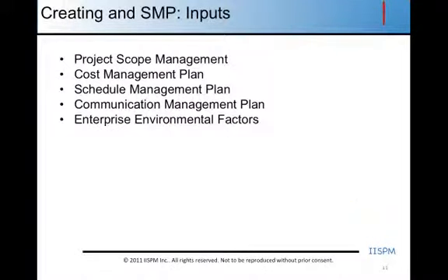So the inputs to create the sustainability management plan. We need the inputs from project scope management. We need the cost model, so we need the cost management plan. We need to understand the schedule through schedule management planning.